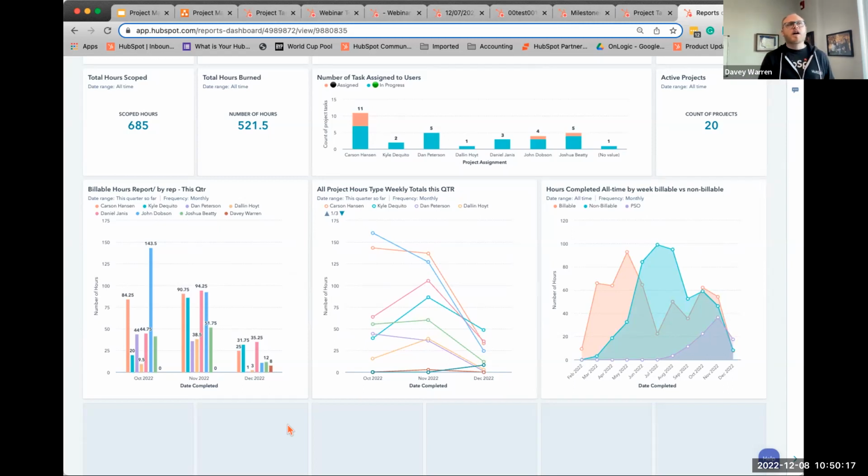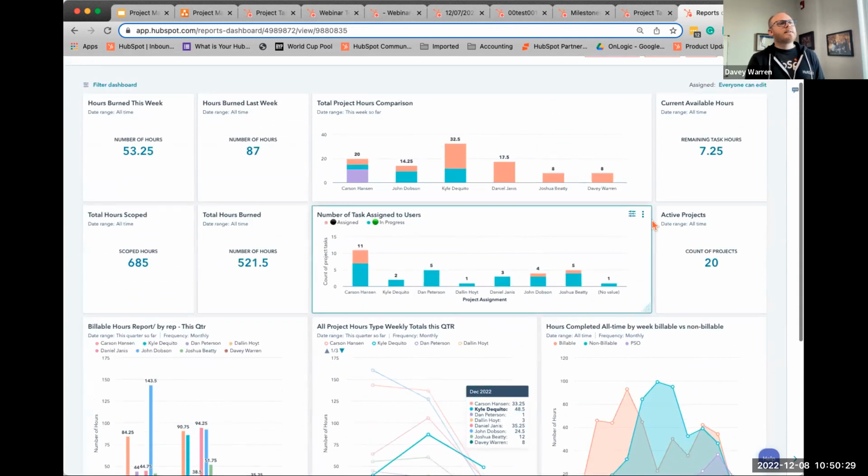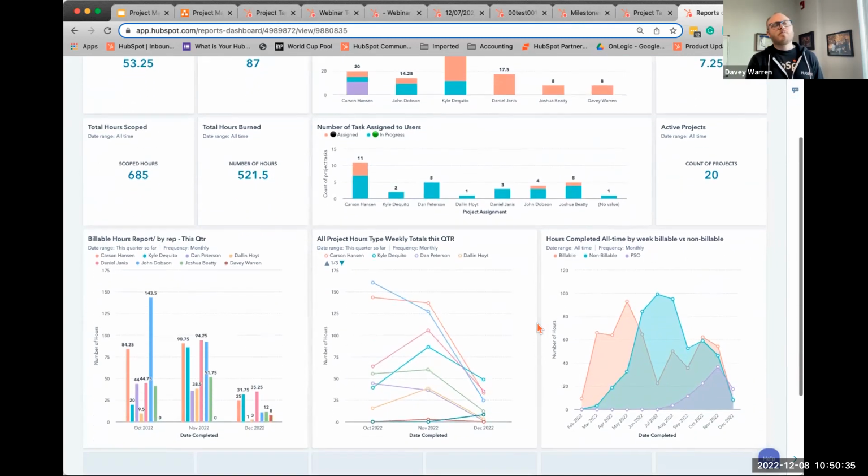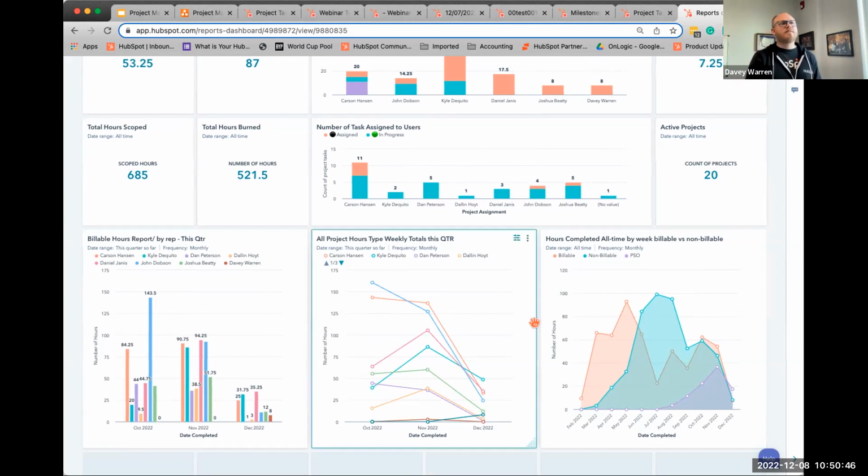The thing that we work on constantly is just getting tasks assigned to people. That is a big thing for us, is we have to have the coffers filled for them to work, and then make sure that we're managing the time associated with it. So this helps us to know what's available, what's been assigned to each person within a task. And my guys use different reports to see those task assignments for hours and what they've been given versus how much they can handle in a given week. So we do have those reports as well.